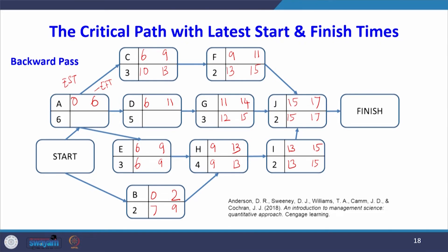For activity A's latest finishing time, the succeeding activities are C, D, and E with latest starting times 10, 7, and 6. We take the minimum: 6 is the latest finishing time for activity A. So 6 − 6 = 0 for activity A's latest starting time.